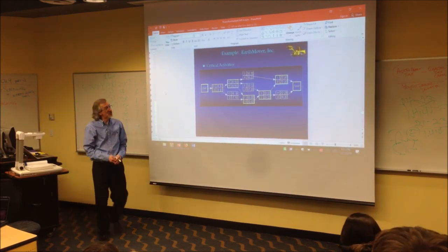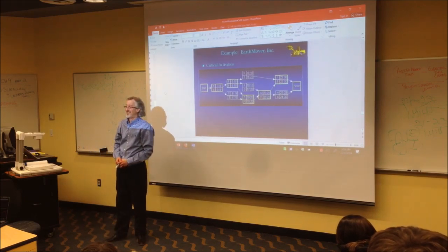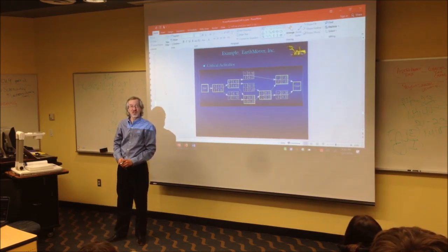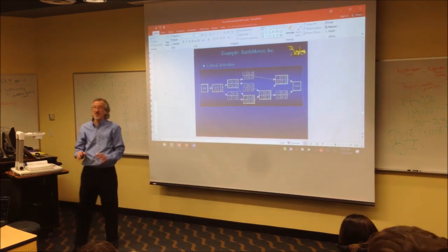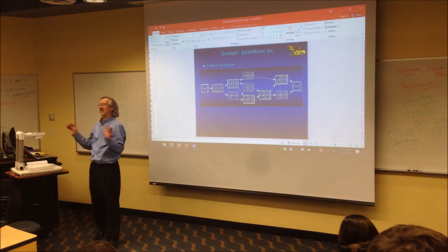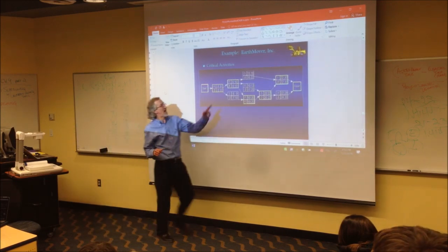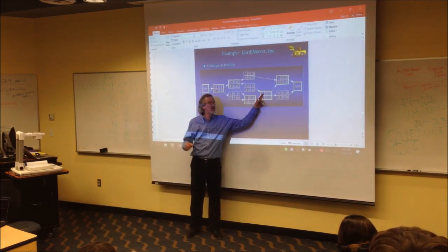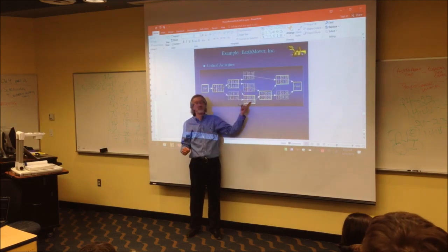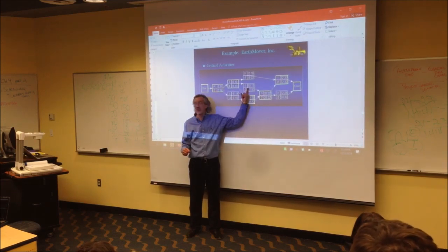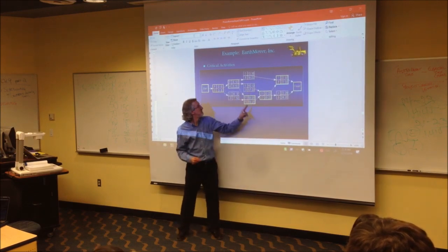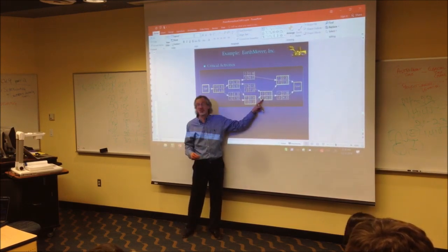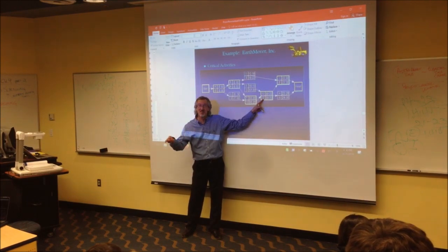All right, let's do G. What are you noticing about G? There are 2 activities that precede it. Here's the deal. You do it exactly like we learned. X sub G greater than or equal to, pick one. This one? X sub E plus, are we doing G? 2 minus Y sub G.